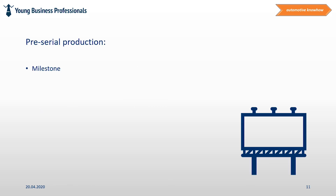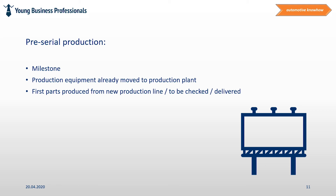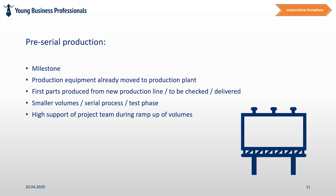Pre-serial production. The start of the pre-serial production is an important milestone in phase three of the project. Ideally production equipment should be in the final plant already. Often the equipment is not yet finally approved as small details need to be changed and adjusted. First parts will be produced, checked, and supplied. Typically quantities are not yet that high in order to slowly ramp up the production. These parts are also often used for production validation tests that will be performed in phase four of the project. It is recommended and often the case that the project team gives a big support in this part of the phase, although some points might be managed already by the future production team.